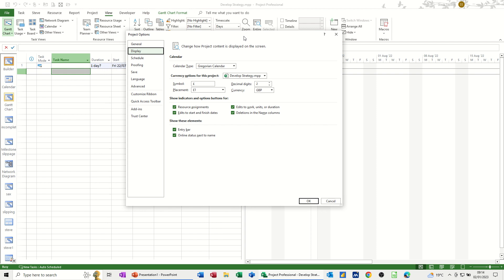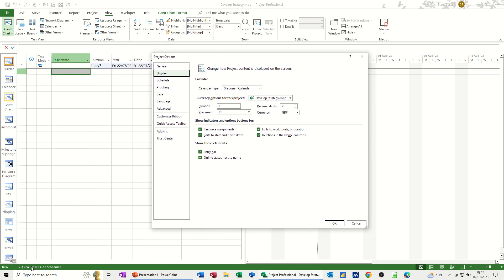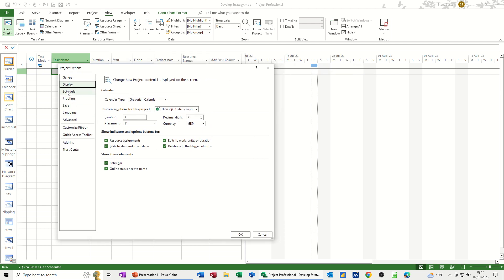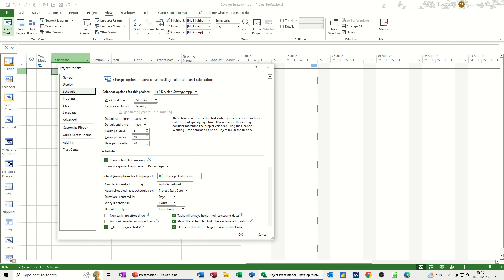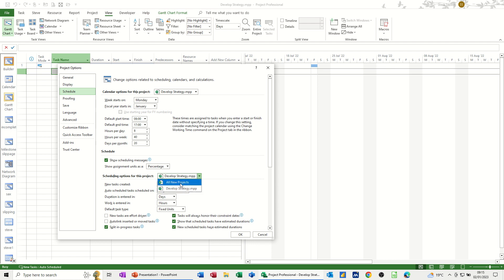While this box is open, another feature I want to do is make sure that every new task in all my projects is set to auto scheduled. You go into File, Options, Project Options, but this time go to the Schedule option. Down here you've got 'New tasks created' and then you've got two options. The default is manually scheduled but I want them to be auto scheduled. Set that to all new projects first and then set that option, and it will be done for you.